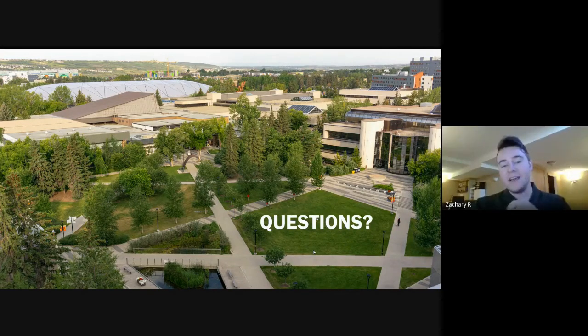Do my other team members have anything else you want to add? Well, to add on to that, at the very beginning of the project, we took all of our class schedules, and I think we all emailed them to either Morgan or Cassidy, and we basically created an entire chart of when everybody was busy, and we looked at all of the gaps in our schedules to determine when we were going to meet up and when we would be free to either plan things out or talk things out or work on the project or work on splitting things up.